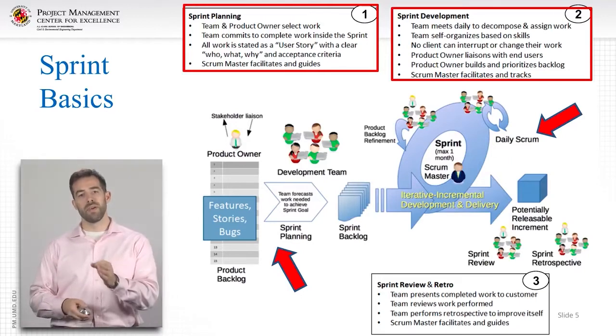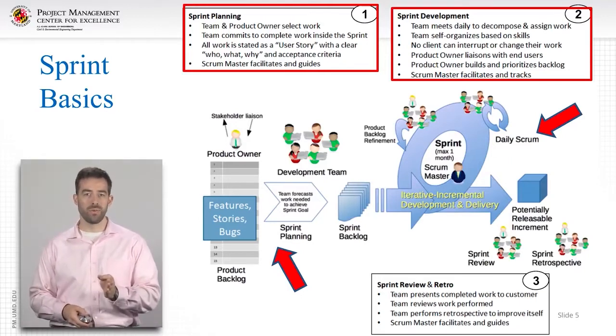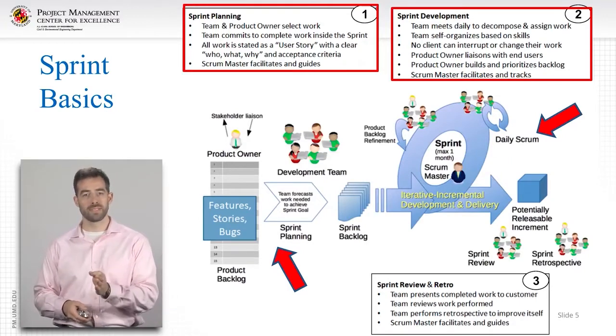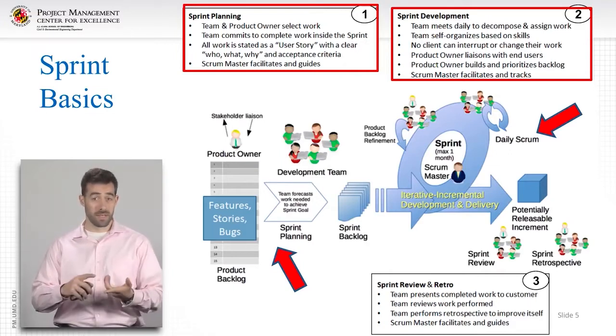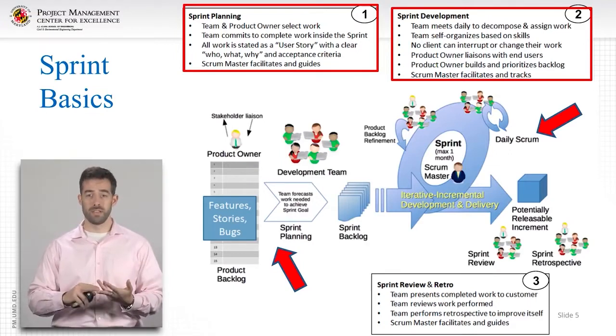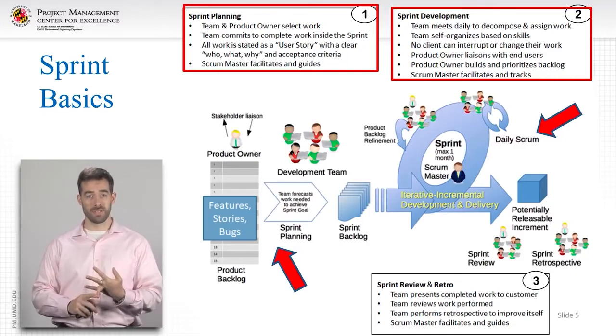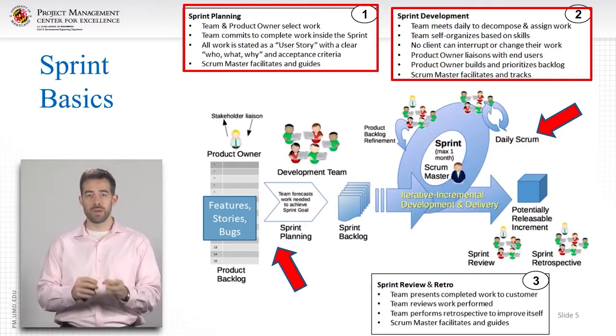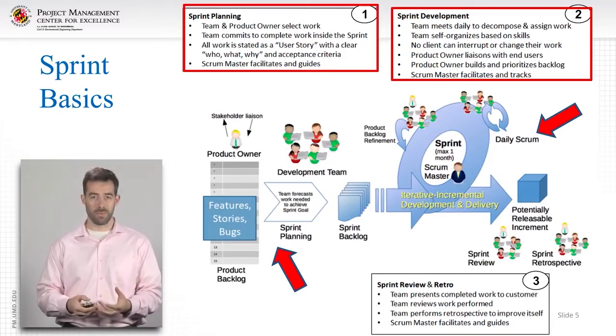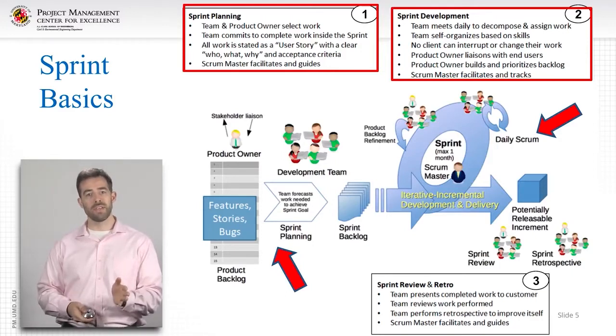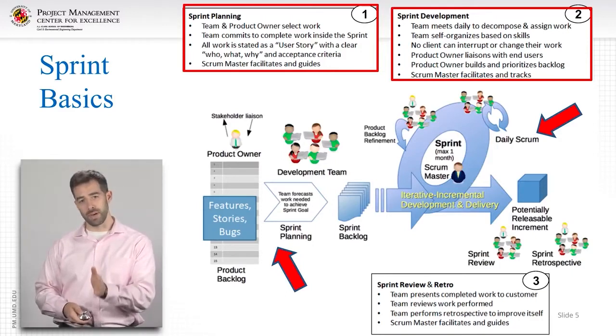During this time, the team will continue to work throughout the 2 to 4 weeks, and they'll be completing stories. They'll be analyzing the requirements, developing the work, and then testing and closing them. They're going to be trying to work story by story because you don't want to have too much open work at once. And by the end of it, they're going to have a potentially shippable increment.